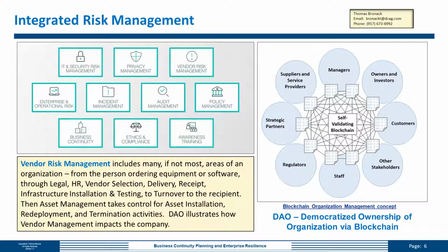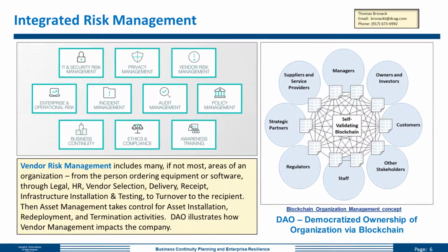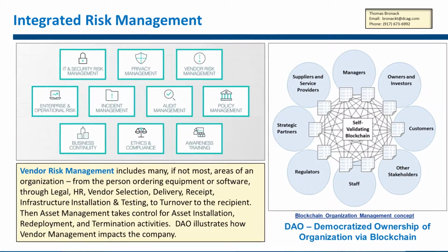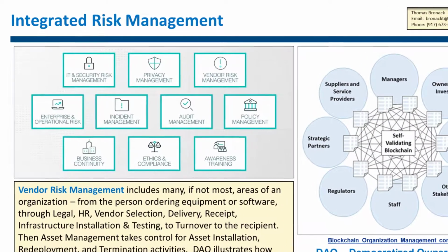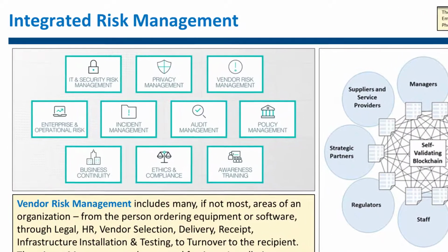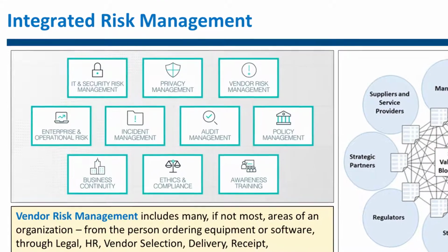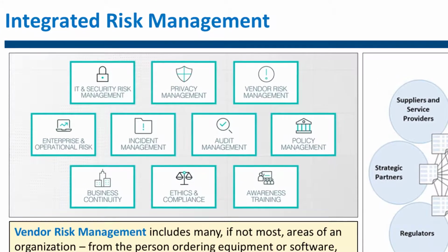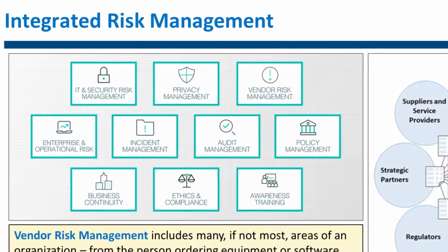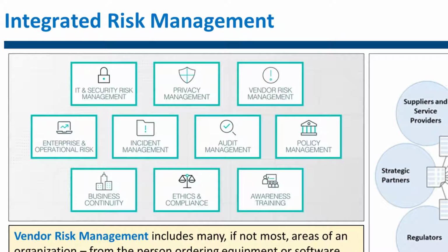Integrated risk management. Risk management is a cornerstone of recovery management and the starting point for all recovery planning activities. The upper left-hand box displays the various recovery management disciplines that should be included in analyzing your environment. These risk analysis studies will uncover any weaknesses in the form of gaps, exceptions, and obstacles to a protected environment. Controls are then put in place to resolve the weaknesses, and risks are entered into a risk register.